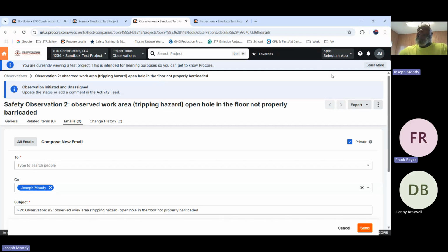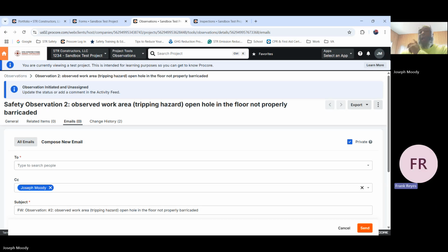Hey, Joseph. Joe. Yes. It wasn't a question for everybody, but just double checking, when I do my hot permit for Monday, it's good till the following? Say it again, Frank. My hot permit's good for a week. For your site, you don't have any indoor hot work, so yeah, you can extend your hot work permit for a week. They're probably going to be doing the same thing repeatedly over and over, hanging the steel and all that stuff. So yeah, you can use yours for a week. I'll get it to you every Monday and just make sure they're good for a week. Oh, hey, that works for me. I'm perfectly fine with that.